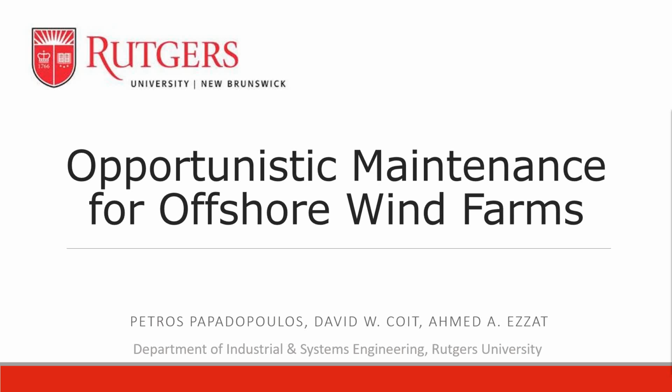on the maintenance scheduling problem for offshore wind turbines by formulating an MIP which employs an opportunistic strategy to minimize total plant costs. The use of the word opportunistic in the context of this work results naturally from the fact that performing maintenance tasks and generally any operation in offshore settings requires the exploitation of opportunities created by the meteorological conditions at the location of the site. And as we are about to discuss, this strategy is very important for making those operations more efficient, minimizing the total cost of the maintenance plan and subsequently reducing the total cost of offshore wind power.